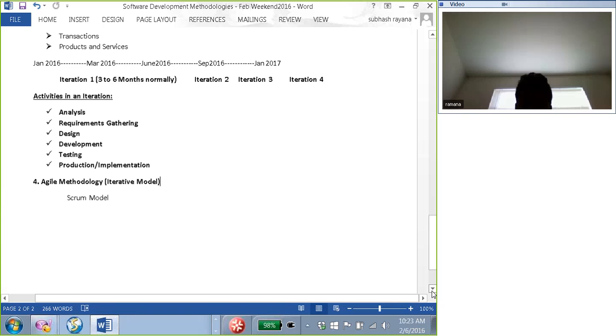The minutes of meeting email will capture the list of attendees who attended the meeting, the key conclusions made in the meeting, any open items which are not still answered, which yet have to be completed, and the due dates for those open items. All that information will be captured in the meeting minutes, right? Which basically summarizes what was discussed in the meeting.